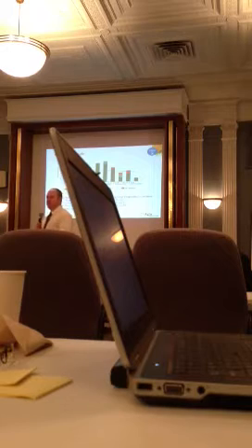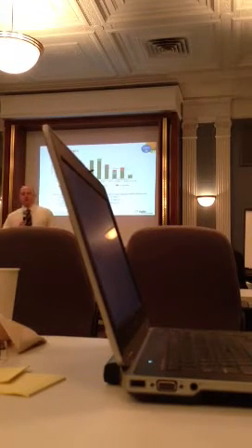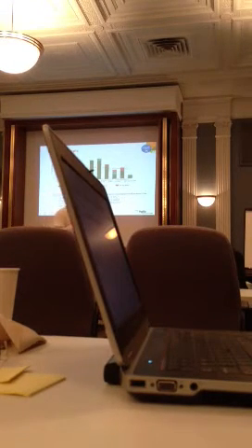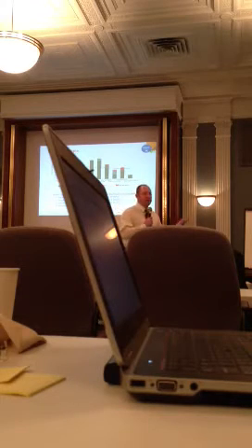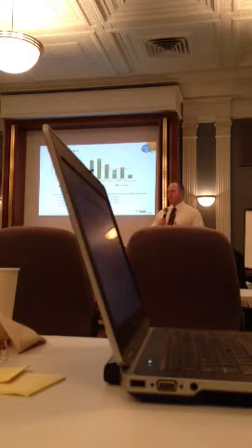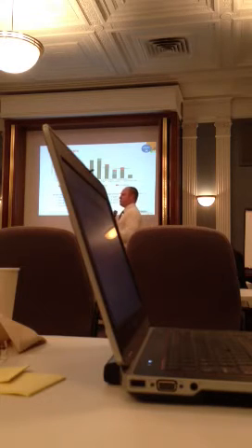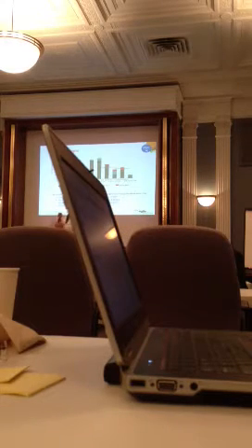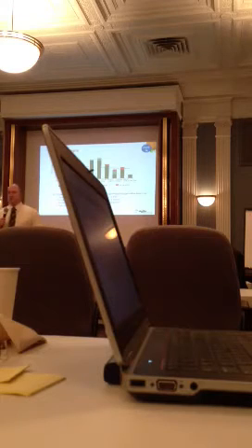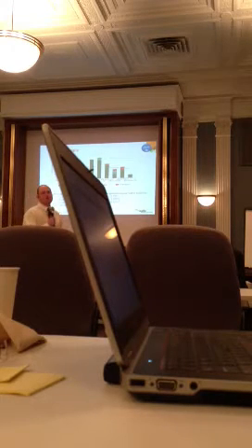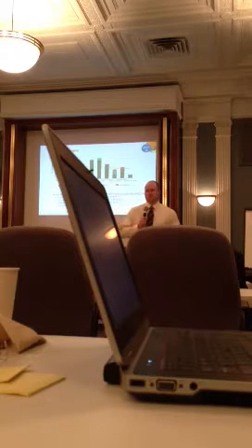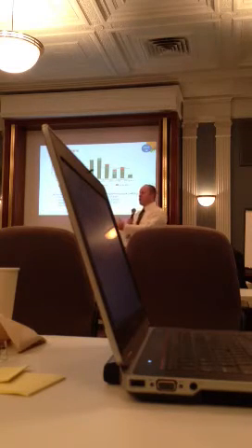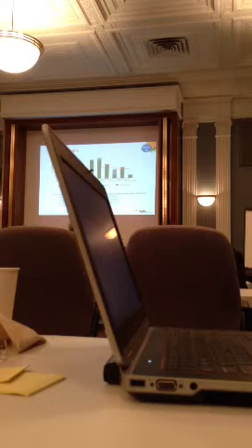What pure Agile would tell you to do by the book would be we accept all the user stories that we had in that iteration. The product owner goes out there and creates all new user stories. We ensure we understand those user stories and they're well formed. We size those user stories. We break them down into tasks. We commit to those user stories. And then we go through and we handle them business as usual. That's what pure Agile would tell you to do. That's what we talked about yesterday, right?